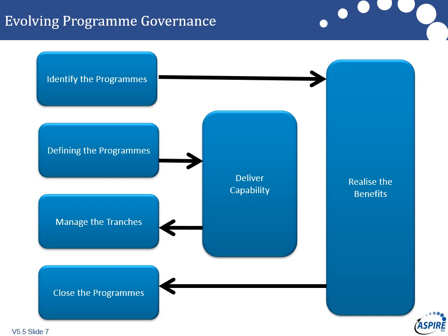You know, if you're putting a big new road junction in, then there may be local authorities that need to be involved, not just for approval, but to put their connections into the junctions as well. So whether you're doing an infrastructure or a transformation program, the defining stage needs significant ownership by the people who are going to operate it.